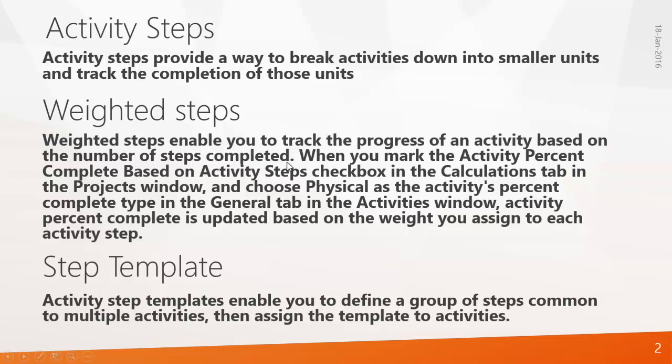number of steps completed. When you mark the activity percent complete based on activity steps checkbox in the calculation tab in the projects window and choose physical as the activity's percentage complete type in the general tab in the activity window, activity percentage complete is updated based on the weight you assign to each activity step. And step template enables you to define a group of steps common to multiple activities, then assign the templates to activities.